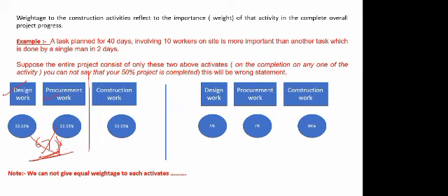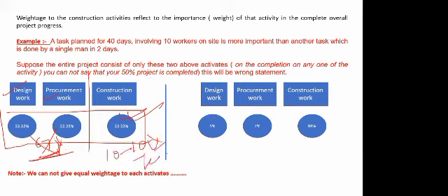And you are saying that you have 67% of progress and you have, in actual, you haven't started working on the site also, right? So this is absolutely the incorrect progress coming up, right? So the thing is that you should never have equal weightages to all your activities। यहाँ पर 10 एक्टिविटीज हैं तो आपने 10% सबको दे दिया और टोटल 100% हो गया। This is not the right approach.